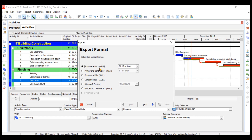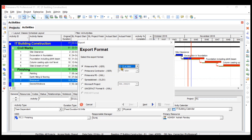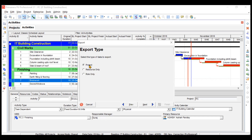Let's try exporting in Primavera .XER format. You can choose the version, but only versions prior to your installed Primavera version. I'll keep it at 21.12 or later and go to Next. Here you choose whether to export the project, only resources, or only roles. I want the complete project to be exported.